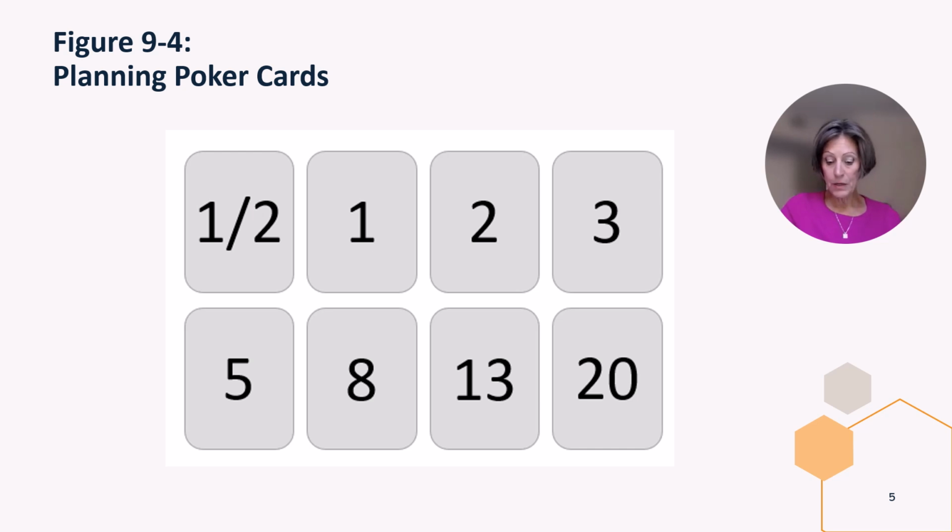Often the daily stand-up meeting is held in front of the project Scrum board, with team members literally standing in front of it. The daily stand-up meeting is time-boxed to 15 minutes and normally limited to the active team and Scrum Master.